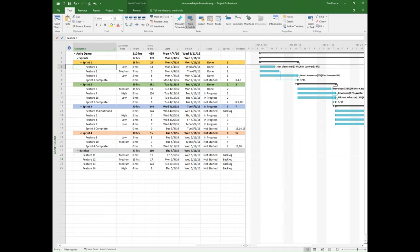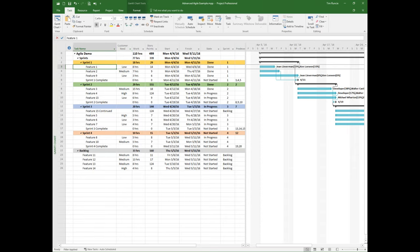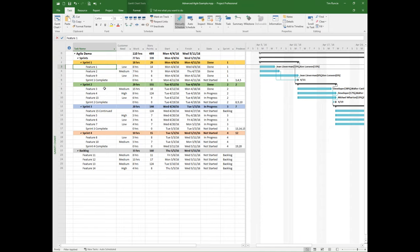The idea is that we deal with what we call the backlog. And the idea from a backlog perspective is that in terms of putting everything out there and everything on the table, you want to prioritize what produces the highest or lowest value. So in this case, in this agile template in Microsoft Project, you'll notice that I've got this column called customer need. And this is very important because in many cases, you are doing portfolio management. But you're doing it at a micro level that says, how do we prioritize what we work on?